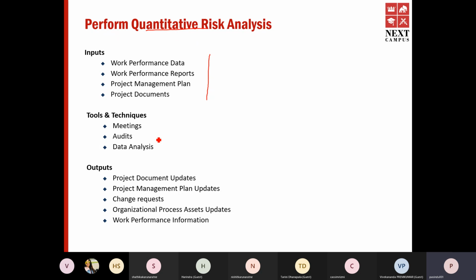So initially, internally with the C-level, we had a meeting. We agreed on absorbing that cost. So remember last week we spoke about budgets. We spoke about reserves, contingency reserve and management reserves. So this is a good example of a management reserve.